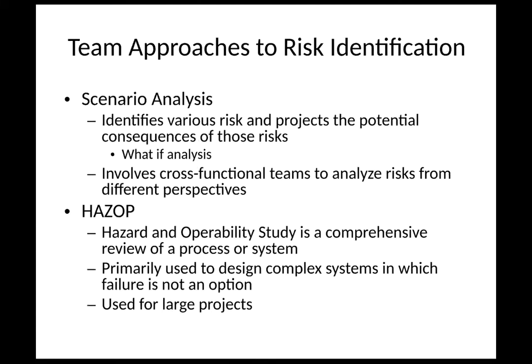Scenario analysis, right? So scenario analysis identifies various risks and projects the potential consequences of those risks. A lot of times when we talk about scenario analysis, we're talking about what-if analysis. And just as the name implies, we say, well, what if this happened? What if this? And you kind of go through, and it's really good with projects. And you say, okay, if this was to break, then what would happen? How would this derail the project?